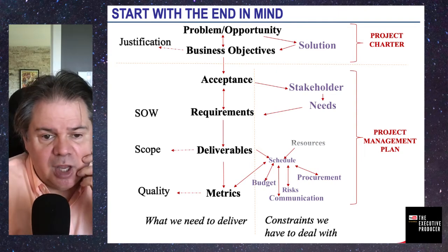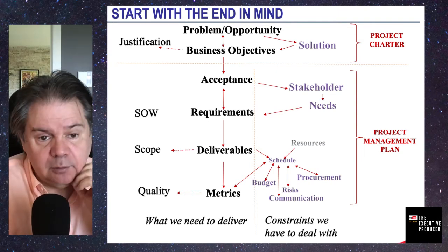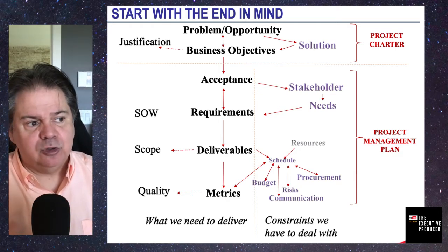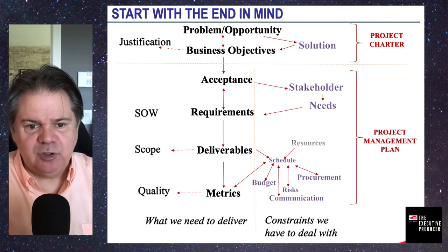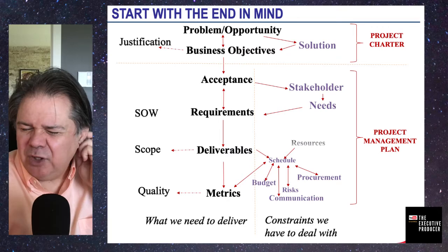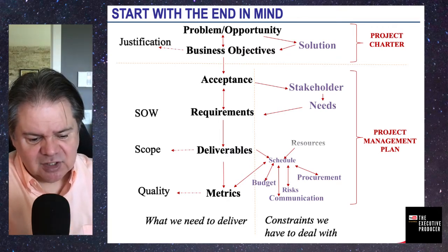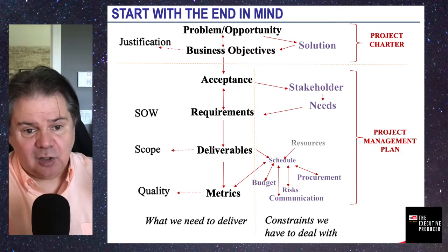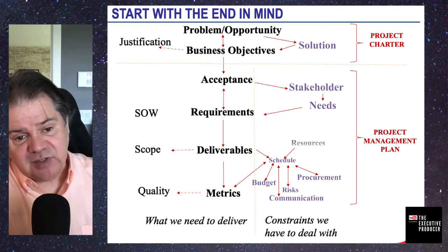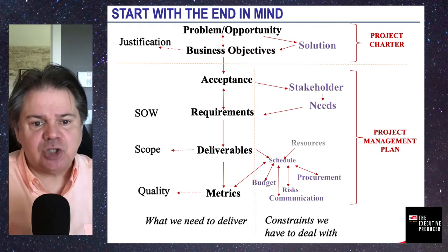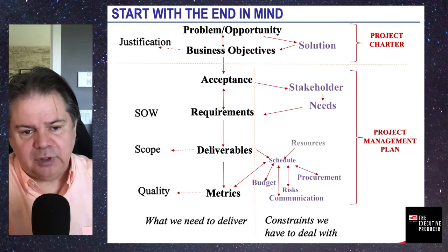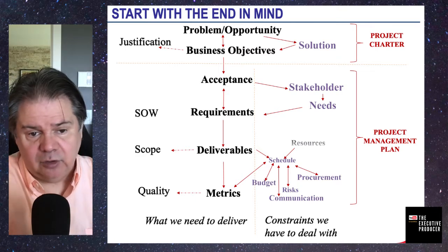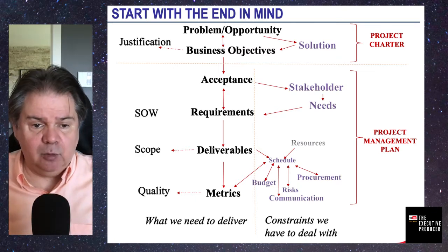And is it going to change? Yeah, it will. I guarantee you, as you move in the project, chances are stakeholders might realize that's not exactly the requirements I had in mind. Or now that we know better, we understand better, it's more like this that I need. So yeah, this thing could evolve. Of course, while we are in planning, it could evolve and change. However, when we're in execution, we will be freezing that. Any change to the statement of work will have to be submitted with a change request and the whole process, and evaluate the impact on the rest of the planning that we've done.